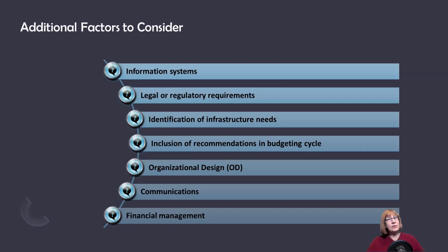Now, here are some additional forces that may or may not apply to you, depends on your project. Do you need information systems? Do you need to meet regulatory requirements? Do you need infrastructure? Do you need to include your recommendations in the budgeting cycle? If it's a big project like solar panels, you may need to do that, in which case, that's going to affect the length of your implementation plan.